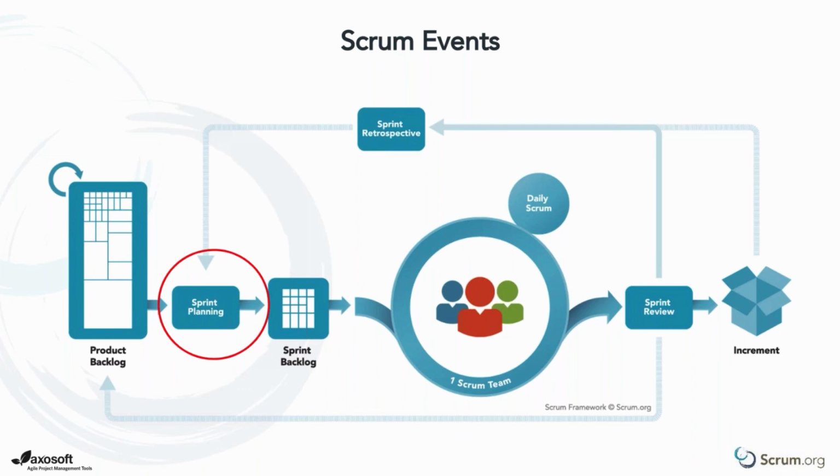We'll often do sizing, and there are lots of different ways to do sizing to start to estimate what that work might look like. By doing sizing, it also helps me see, do I really need to refine this item down into multiple items because it's really, really big and probably not defined well enough. It helps me look at those items and make sure they're well understood between the product owner and the development team. It helps me build out what we're going to do.